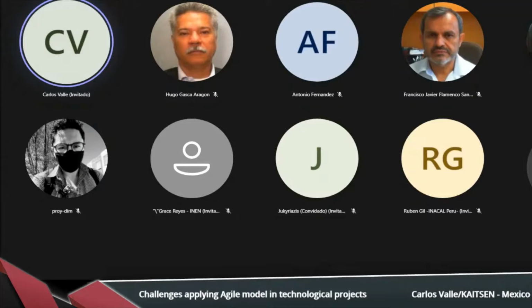Also, mostly as an integrator, depending on the team, you can analyze if the product is going to change, if the product is going to evolve, or if it's a stationary product. If it's a stationary product and the process is mature, and maybe the team doesn't have the soft skills needed, you can go to a waterfall methodology.